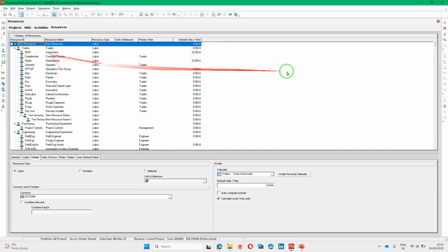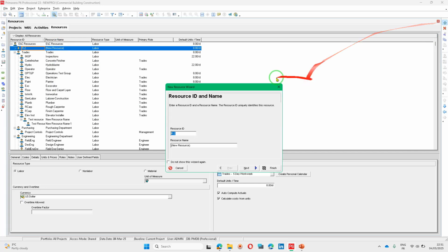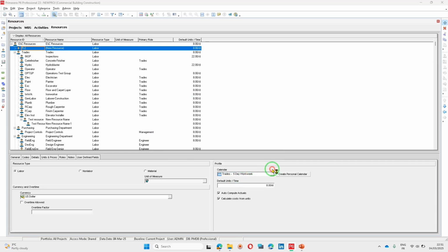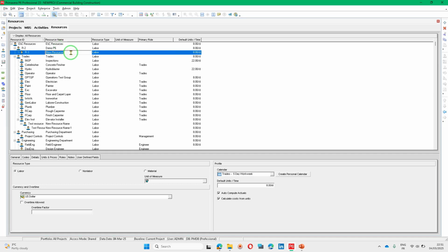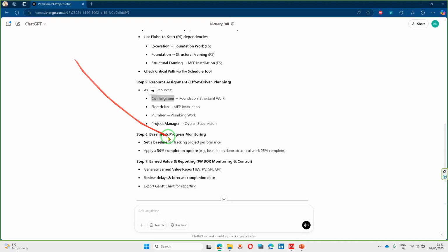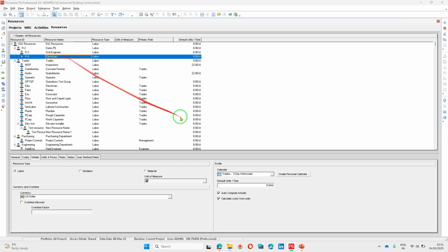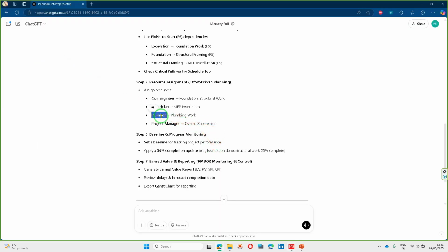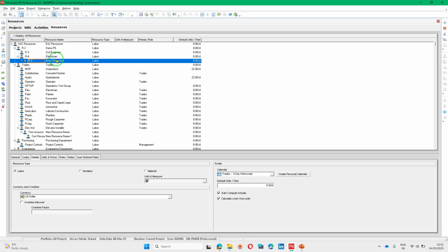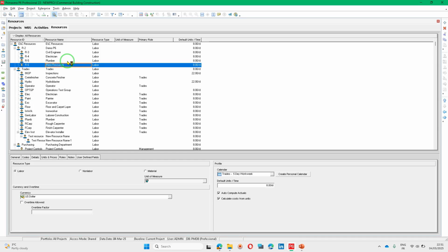We already have a database. So on the right side, you can click add a new resource. Let's say demo P6, finish. Resources here, and then I'll click on insert, and I'll have the resources that I need. Again, insert, electrician, and so on. I can move the resource to the left and add the others as well. Let's say plumber. Remember to have the proper structure.